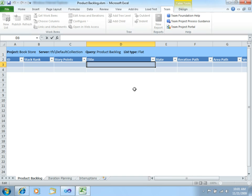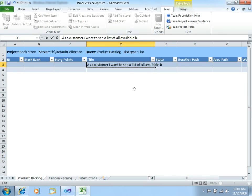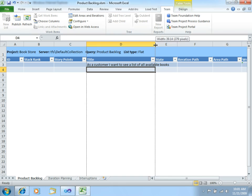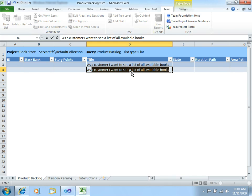Okay, so first one will be, as a customer, I want to see a list of all available books. Another one, as a bookstore administrator, I want to add a new book.